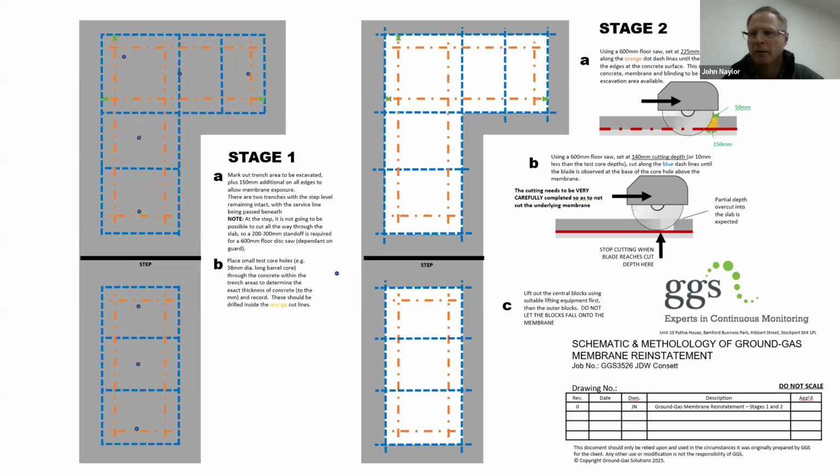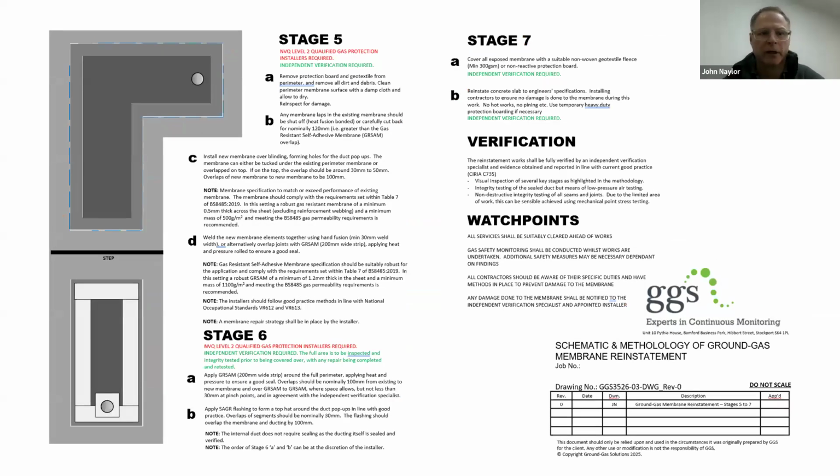It takes time. Of course, time costs money, and contractors just want to get on with it. But this is where the design really comes to the fore, because it shows them what they can do. So when they're pricing for that work, they're doing it at a reasonable pace to what their expectation is. Not just go in there, cut saws blazing, and off they go, which, sadly, is what we tend to find, and we're called in after the event.